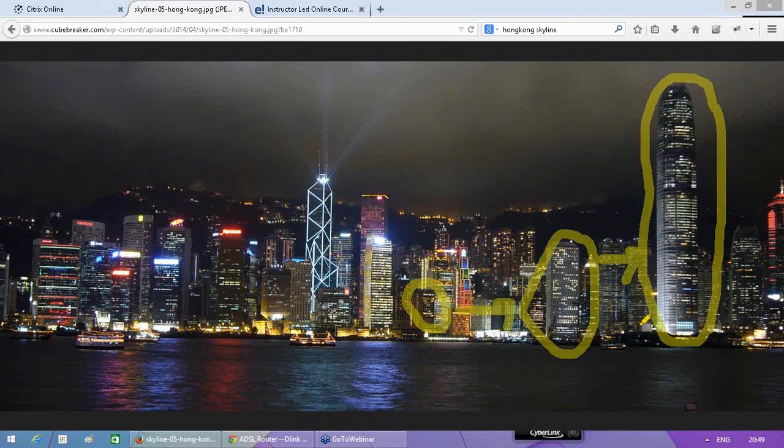Okay, so when we are talking about analogy, there are two terms which come up. One is absolute estimation and another is relative estimation. My calculation of this 300 meters was an absolute estimation. But when I said this is half of this, it was a relative estimation. Because here I was talking about absolute numbers, so I did all the calculations.